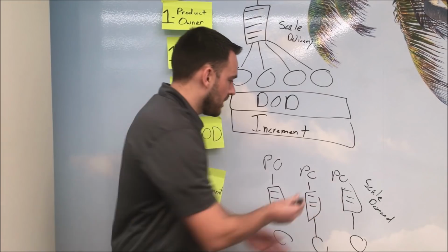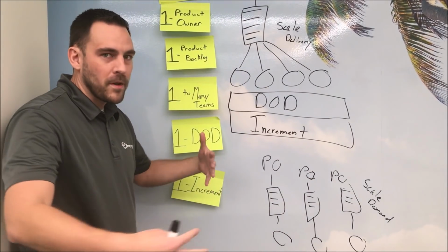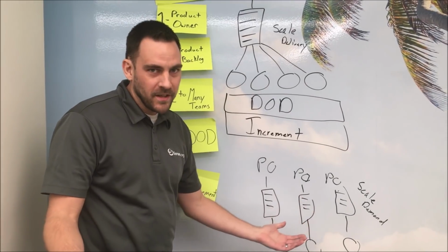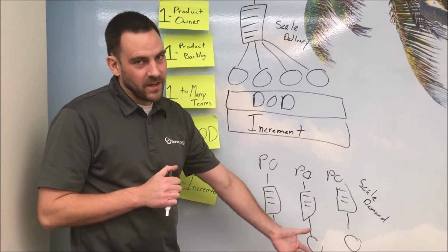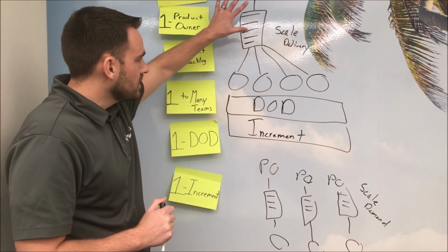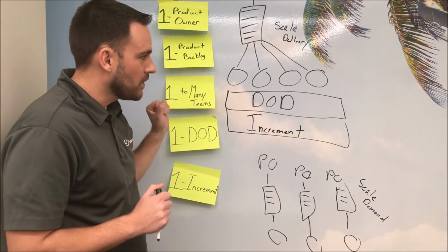And because we're adding more and more demand, more and more backlogs, we're getting more and more specialty. By adding more and more specialty, we're actually removing agility. Specialty is really the enemy of agility. So these are some basic concepts when we talk about scaling.